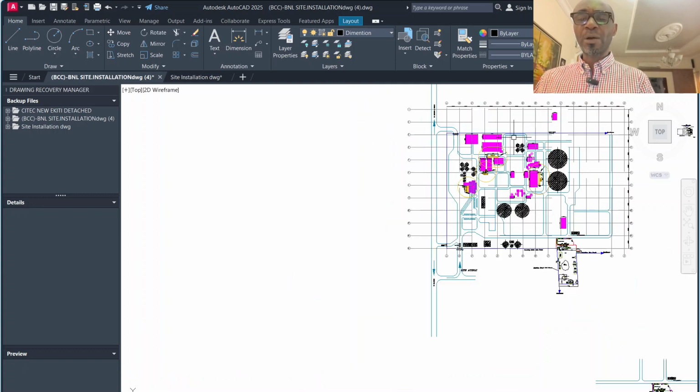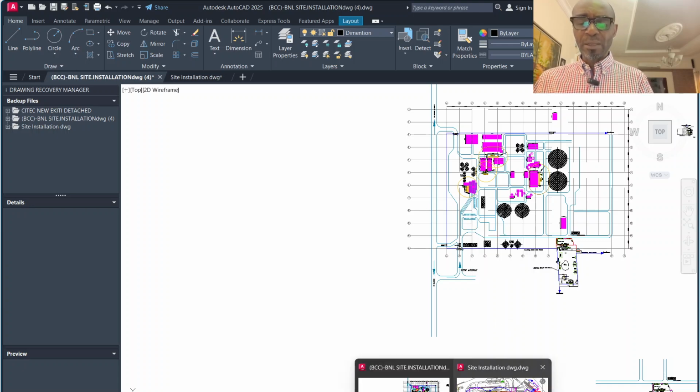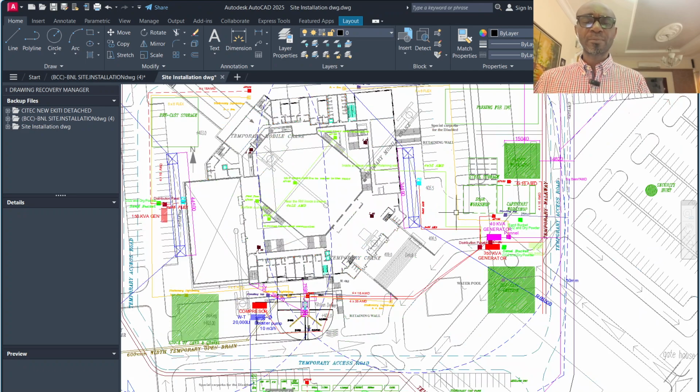So I will take us now and further explain with another, more comprehensive drawing. The other drawing is where you can measure your wiring and lighting. You can measure the length of cables that you need to electrify this area, because it is showing you even the kind of panels that you provide at each junction for the workers to tap lights wherever they need it. So I take you now to this.